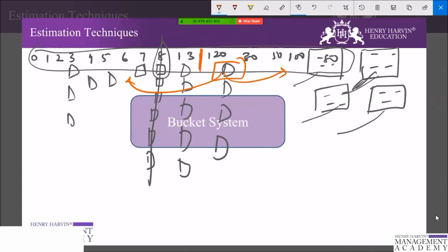If the distribution of the items is skewed to either end of the scale, then during the sanity check step, the group should also discuss whether the items can or should be spread more evenly along the scale. If so, the group does it collectively. Any activity that is going to happen is going to be a group activity. Always remember that. The facilitator should watch to make sure that no one moves items that have already been placed until the sanity check step. So I'm repeating again: what happens in the sanity check?